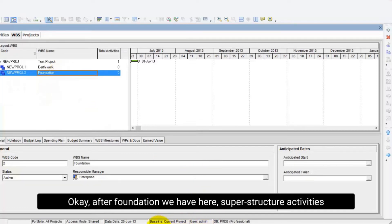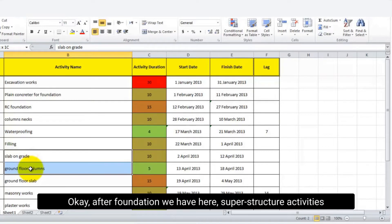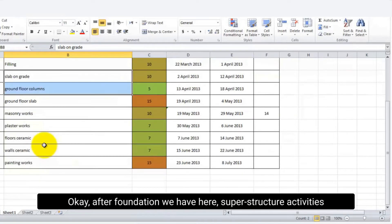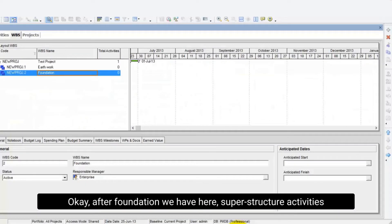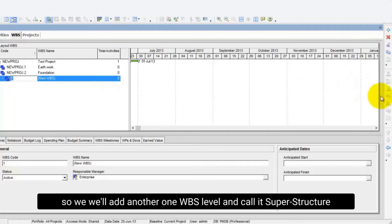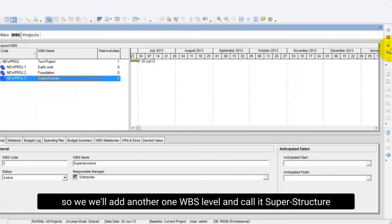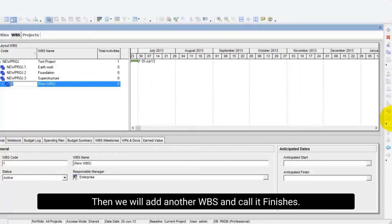Okay, after foundation we have here superstructure activities. So we will add another WBS level and call it superstructure. Then we will add another WBS and call it finishes.